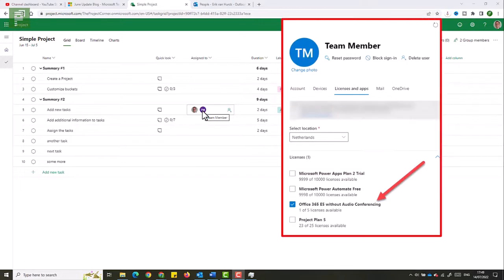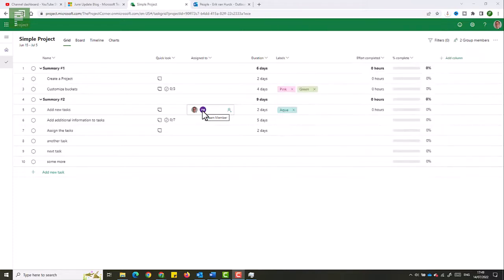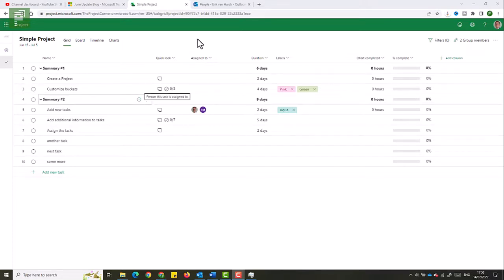This team member only has an E5 Office license, or Microsoft 365 license. So that user will not have the option to create projects themselves, which is exactly what we want — this is just a team member, not someone that will create projects. But this user is assigned to the 'add new tasks' subtask, so that person can now edit that task but not everything. There are some parts within the schedule that person can edit.